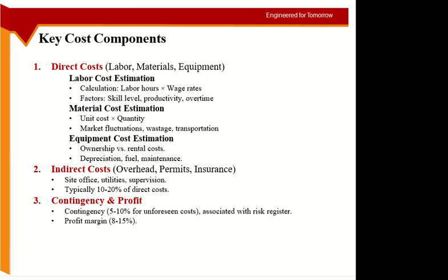Okay, some of it gets stuck in the mixer, some of it drops while you are transporting it, some of it is used for testing. Okay, some sites may require many tests. Okay, so it could be test for even only cement and aggregates separately. So obviously this is also material, right? And there could be tests for the mixed concrete as well. So this is also obviously the material which you are not using on the site itself.